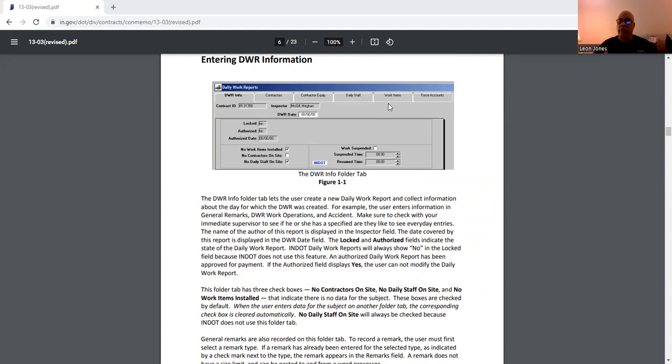A change order specialist reviews your change order to make sure that what's in that change order specifies why the contractor needs this extra money. For instance, if there's a different field situation or unexpected field condition, will you tell me why? It's the who, what, when, how, why, and where.